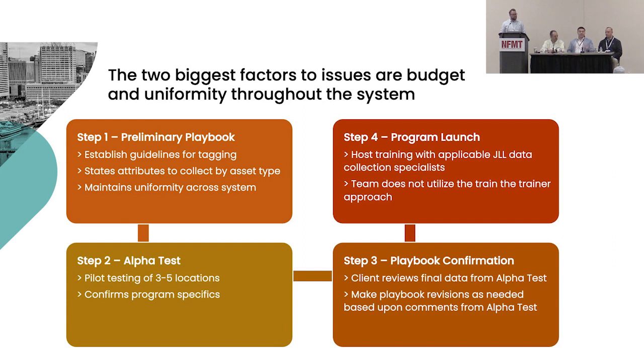So dealing with these contractors that come in and do a demise, good luck getting them when they're on the way out the door. I've had a lot of trouble, and I've yet to see an operative model. The only thing I was able to do to drive performance was building a dashboard that tied assets to real estate developments, and then putting the PM's name next to the data migration.